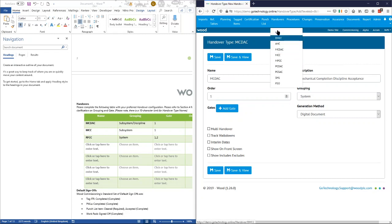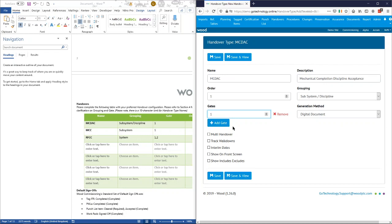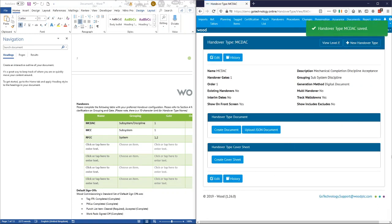We'll set it as number one so it appears at the top of the list. We are grouping it by subsystem and discipline, and we can choose the gates — just one in this case. There are a few different things here: we can choose to make it a multi-handover so it can cover several different scopes at once, and we can describe that more in a later video on handovers. We can choose whether we want walk-down information in there, which we do. There's also an option to include one of the handovers on the front screen so it'll be shown on the dashboard charts, which we'll choose. We're not going to use interim dates or the includes/excludes option. Then we'll save that.